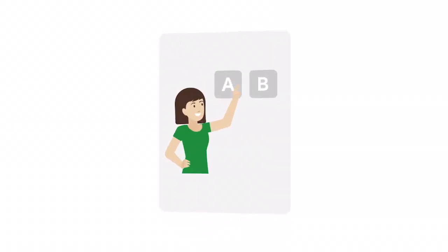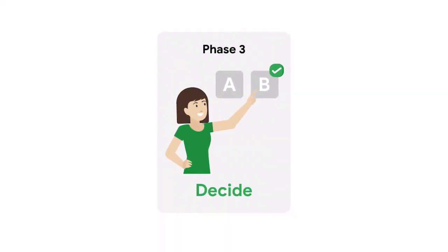On top of all the ideating that happens in phase 2, you also need to start planning for user testing, which happens in phase 5 of the sprint. During user testing, you'll have a diverse group of people test your product and provide feedback. To be able to do this, you need to start recruiting users that fit your target profile now, so the sprint stays on schedule.